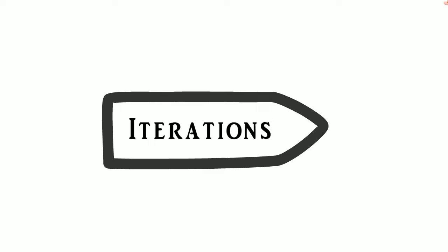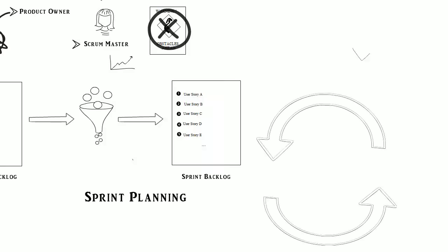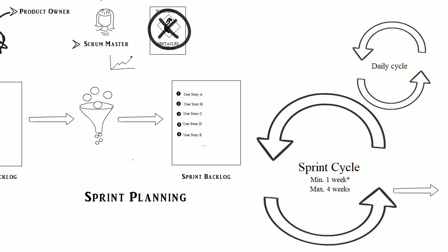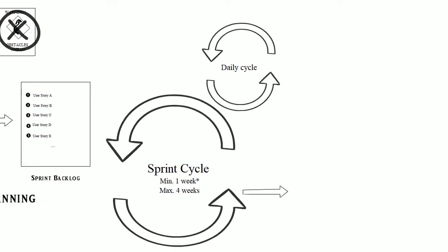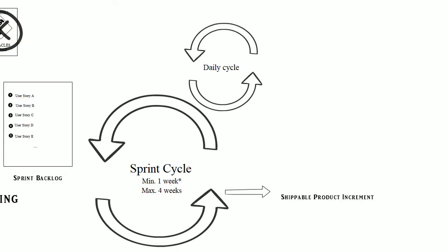Sprint in the Scrum framework is the time period during which the Scrum team executes the product requirements, the user stories. Sprints typically range from 1 to 4 weeks. Once a team and the organization have decided how long a sprint should be, that length of time is kept unless the team is able to reduce the time and deliver a workable product increment within a shorter time frame.